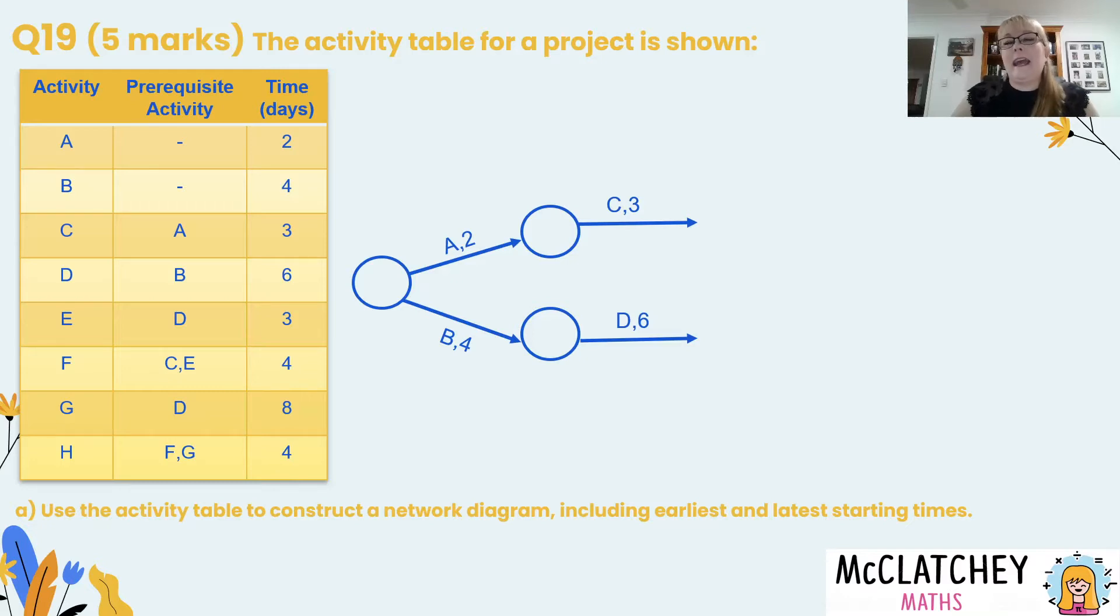We need to end activity C and D with a vertex but what we're going to do here is move activity E up towards C. Now sometimes when you're drawing these you might be drawing them in a linear way and then as you get through the project you realize you need to actually diverge here. What I can see is going to happen if I look ahead in my activity table is that activity F is going to come out of C and E. Well I've already drawn C so I'm going to bring E up towards it so that I can branch F out from there. F is four days in duration.